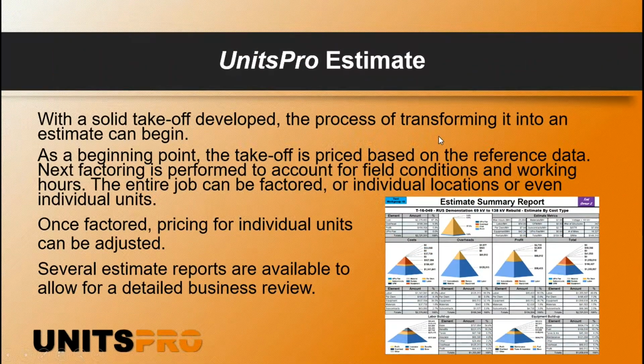They're going to go through and they're going to look at every one of the locations and they're going to factor the job or the locations or even an individual unit to get the hours that are required to execute this scope for them in the field.